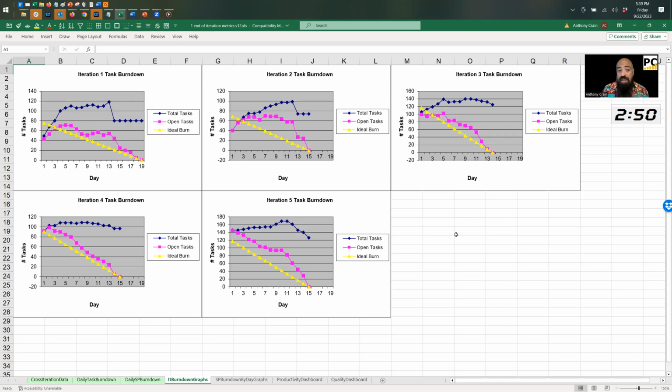And when you look at this, again, same rules. Pink should be next to yellow. Blue should be stable. When you know those 2 rules, and you'll notice the goals aren't written in here, so we should probably improve that. Blue should be stable. Pink should match yellow. So if you look at this, not very stable, but not bad. For a team that's in their very first sprint ever, pink next to yellow, actually also not bad. So they actually did pretty good.